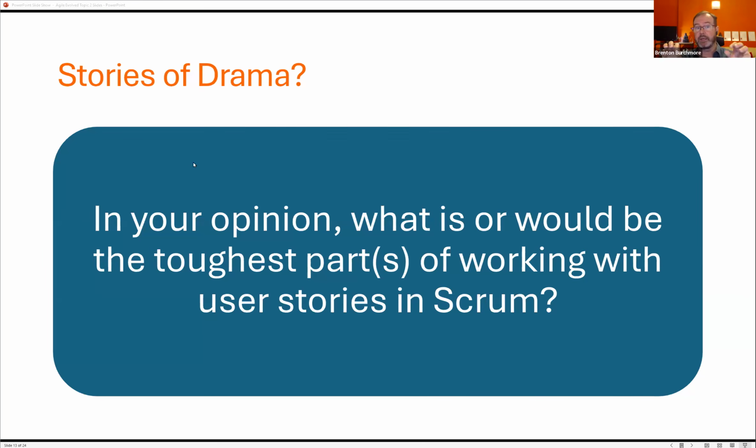And the reason you do that is because every 2 weeks, there's going to be crossover synergy that they're going to need to react to. And remember, we said that a sprint is a sacred period of workflow. What you never want is to suddenly discover halfway through your sprint that some other team has made a whole bunch of changes and decisions that are going to upset what you're doing, and you've got to react to that, and suddenly your sprint is being ruined. And so that's why you must have a rhythm, and that's why typically it's always the same time period.